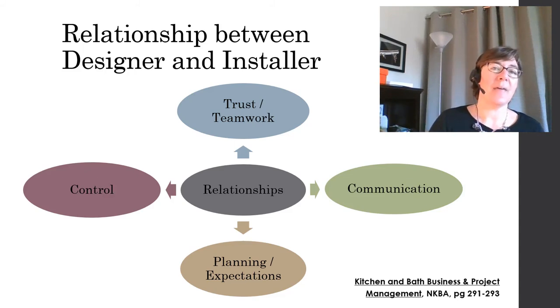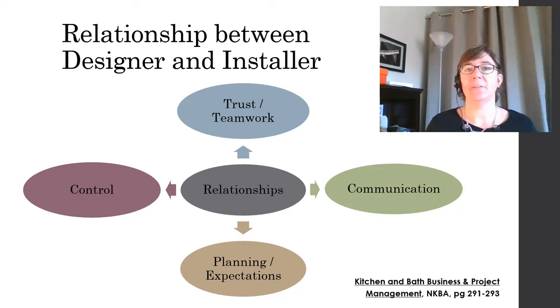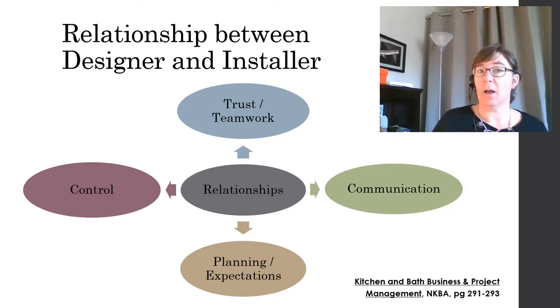And part of that plan, by the way, involves the last one, which is control. Who's in control? Who's making the decisions? And sometimes it changes based on where you are in the project. One of the articles mentions that at the beginning of the project, the designer should have like 85% of the control, and the contractor or installer maybe 15%.